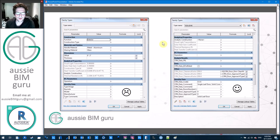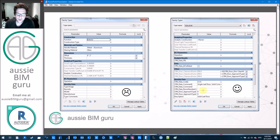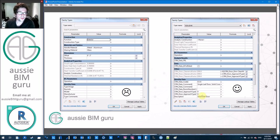Here's a door I would say is good — it has a lot of information: a type, fire ratings, lots of dimensions. They're all shared parameters so you can schedule them. There are codes and descriptions, so you can limit a schedule to show particular things — for example, filter by whether the description contains 'door' in a multi-category schedule.